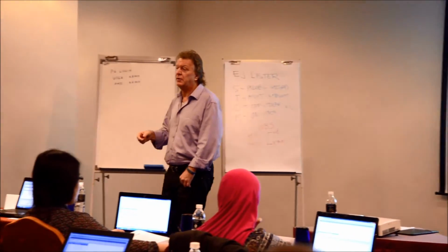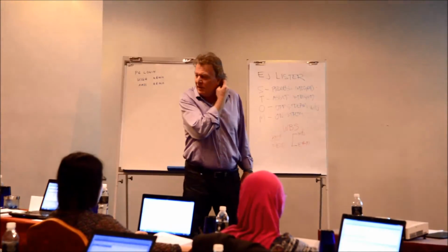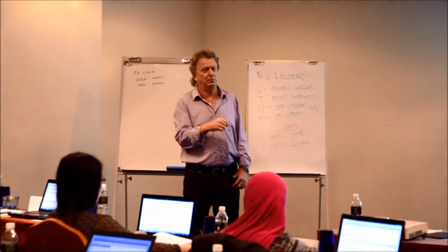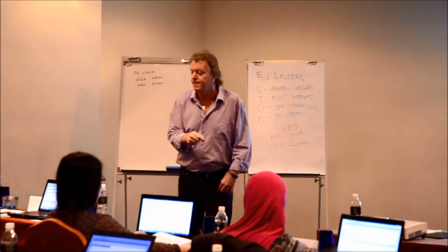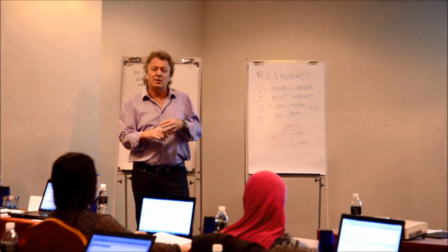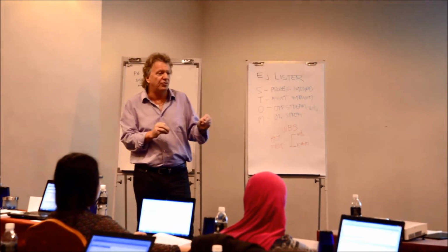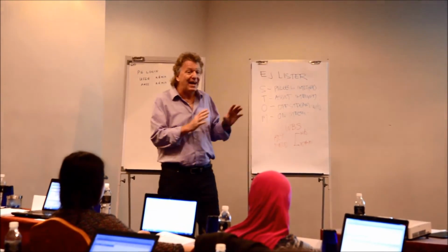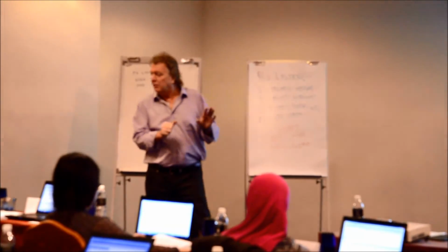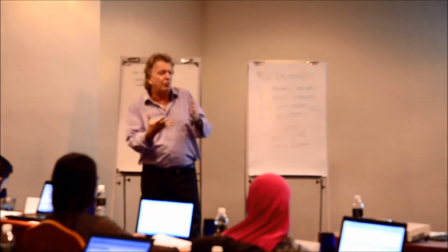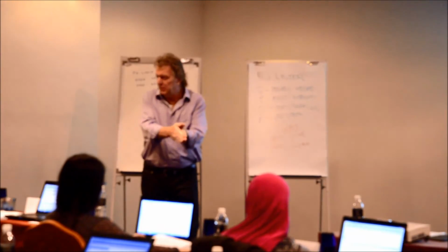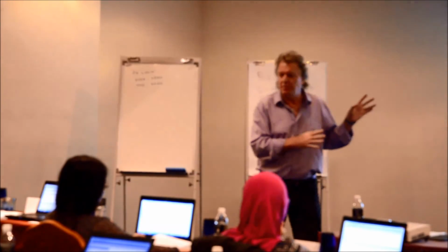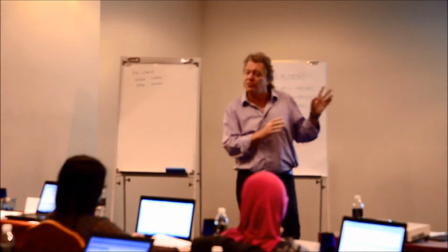So when I say the Gantt chart, remember the Gantt chart picture? Is that a schedule? In this room, no. For the next three days, it's not a schedule. Schedule is a word that we use, an action verb, to produce a project plan. So you're going to hear me talk about the project plan all the time. The plan is not complete until every stakeholder has put their strategy into the plan. The planner and scheduler can only schedule what has been planned and estimated and the strategies.